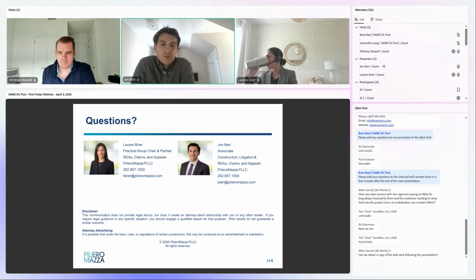One key thing to pay attention to is the government's requirement for response times to submittals. So it's a good idea for contractors to be tracking dates in terms of when submittals were submitted and when that response ultimately came in and what impact that had on the project schedule. We've had a couple cases like that come up recently where there's significant delay on the side of the government in responding to submittals, which is holding up a critical path of the schedule.